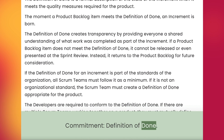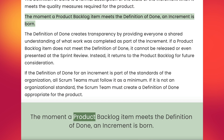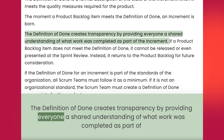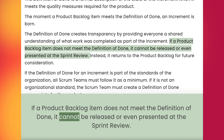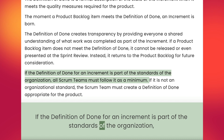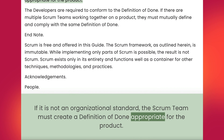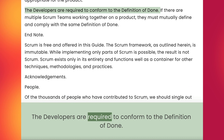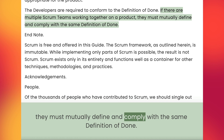Commitment: Definition of Done. The definition of done is a formal description of the state of the increment when it meets the quality measures required for the product. The moment a product backlog item meets the definition of done, an increment is born. The definition of done creates transparency by providing everyone a shared understanding of what work was completed as part of the increment. If a product backlog item does not meet the definition of done, it cannot be released or even presented at the sprint review; instead it returns to the product backlog for future consideration. If the definition of done for an increment is part of the standards of the organization, all Scrum teams must follow it as a minimum. If it is not an organizational standard, the Scrum team must create a definition of done appropriate for the product. The developers are required to conform to the definition of done. If there are multiple Scrum teams working together on a product, they must mutually define and comply with the same definition of done.